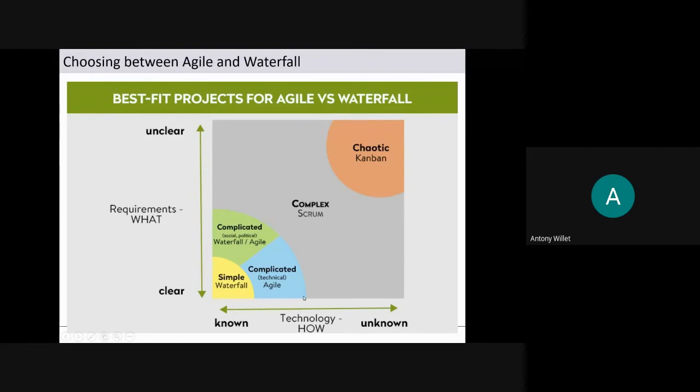The team has experience with the programming language, but some part of artificial intelligence needs to be included, and the team does not have any experience with artificial intelligence till now. Okay. So if this is the case, familiarity with the technology is around 20-30%. Then we can use either waterfall or Agile. But if the technology is complicated, it is recommended that Agile be used. It is preferred to the waterfall method. Okay. Hope you understand the plot.